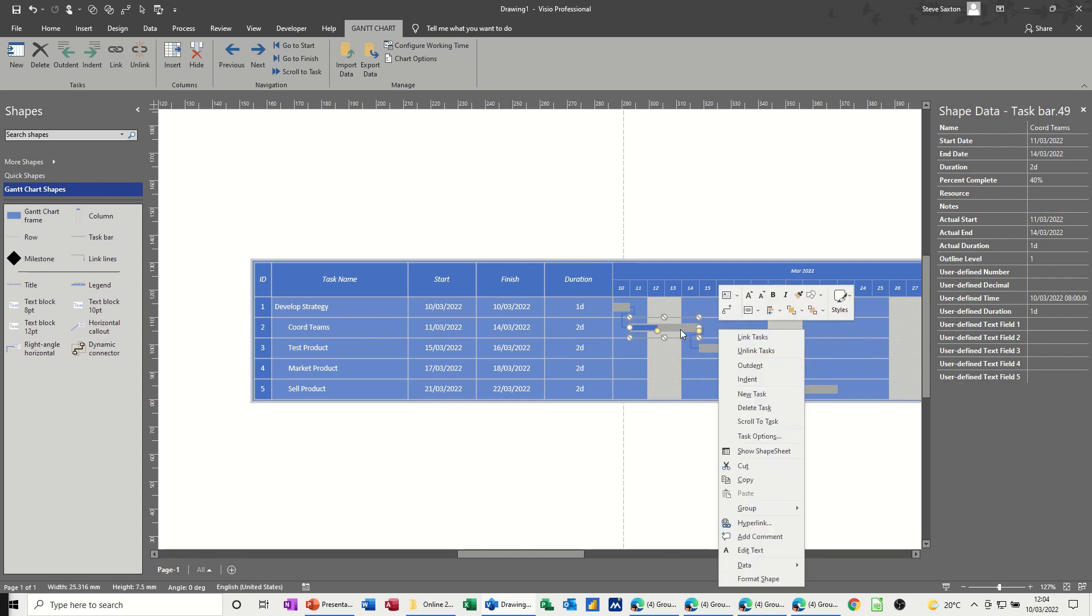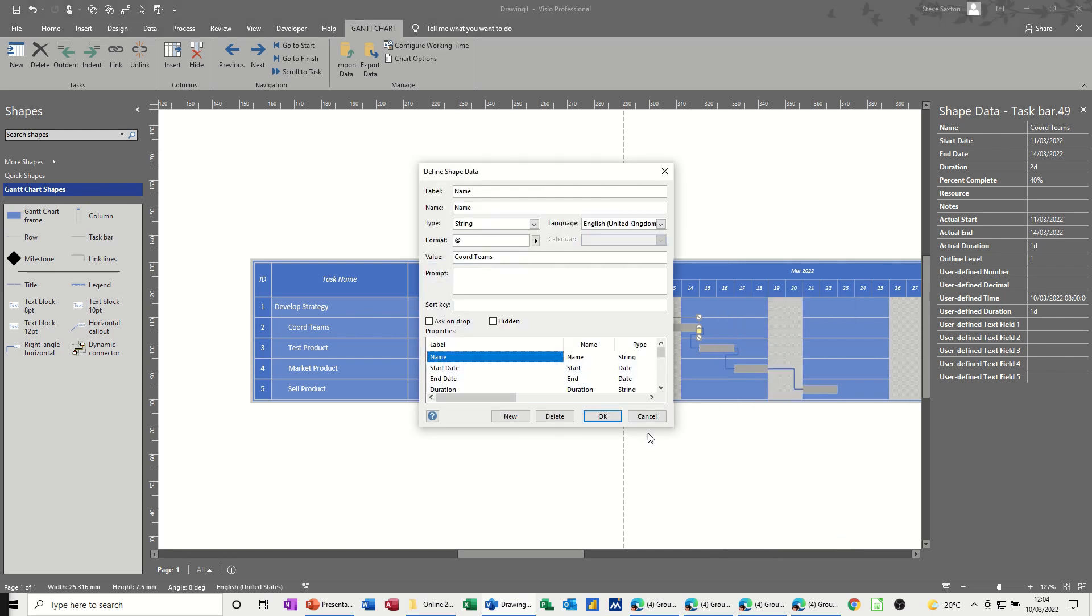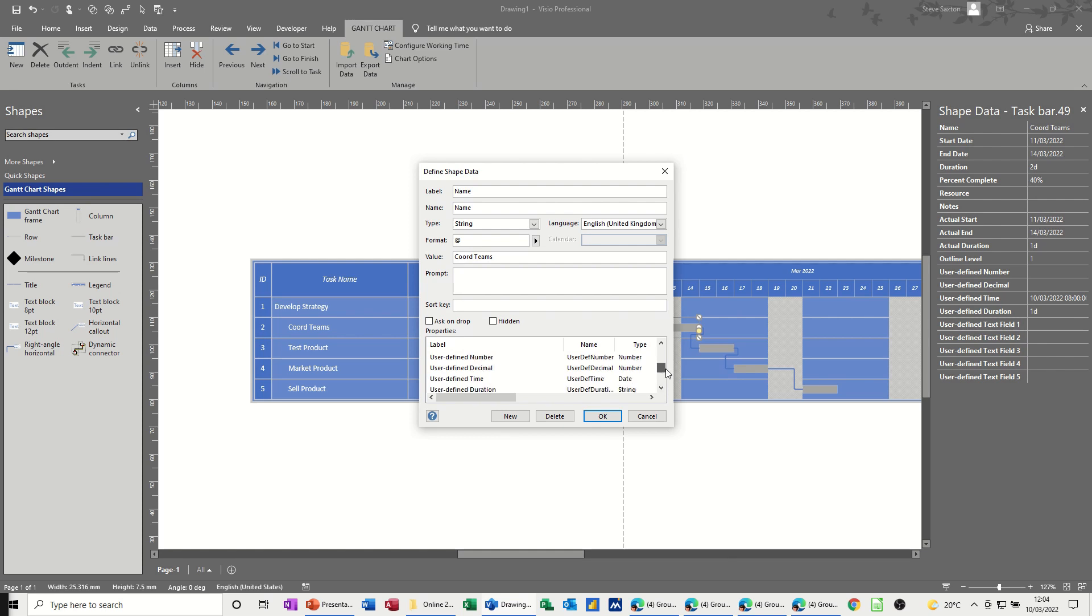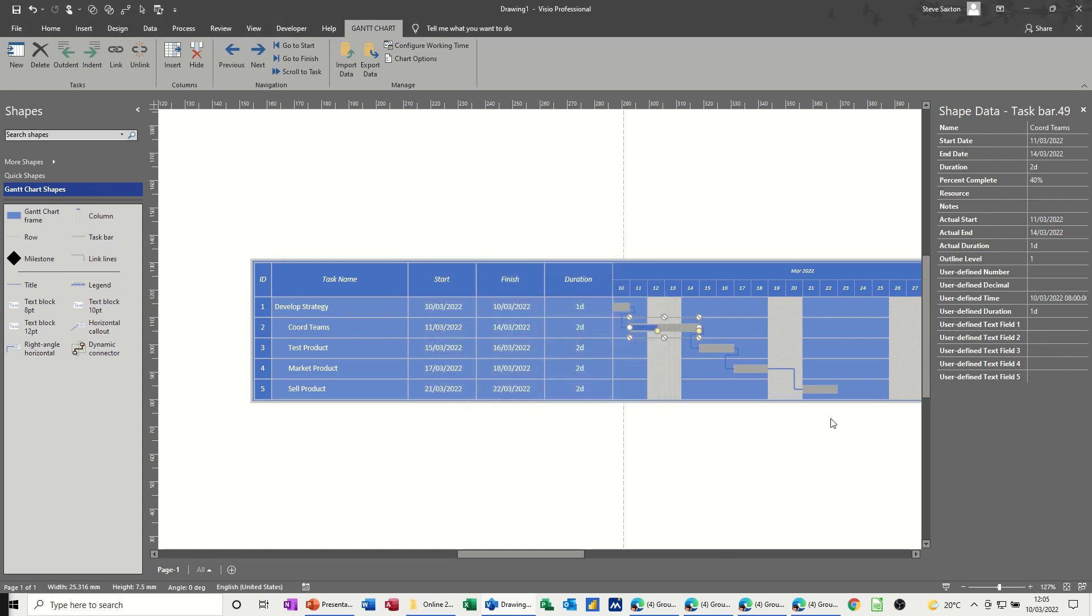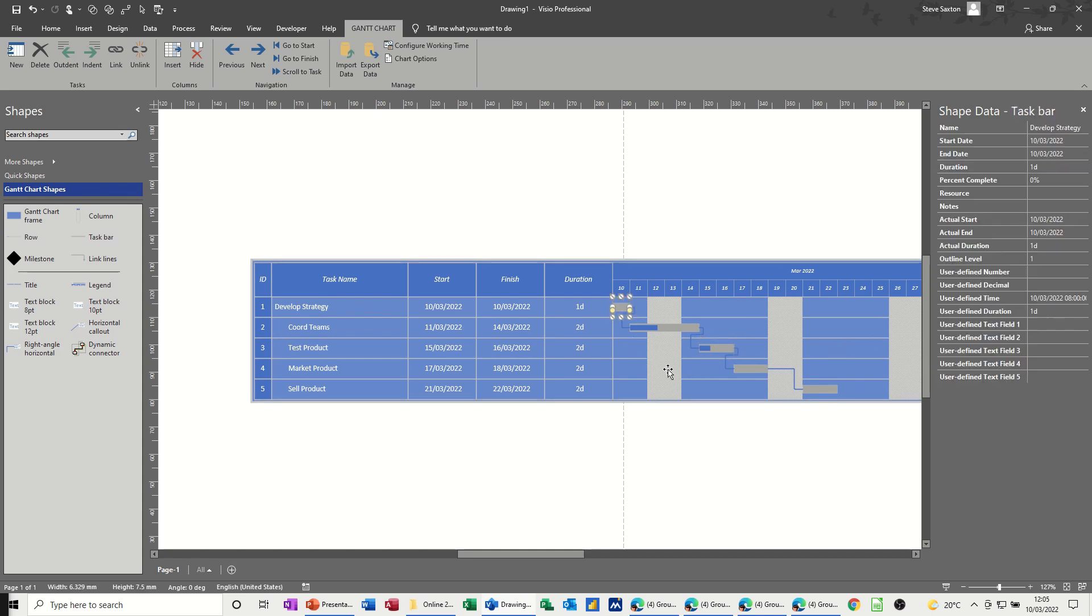And if you right click on the shape, you can go into define shape data and add your own, or delete some of these if you don't want all of these. I'll just cancel that for now. Now so each shape, if you click on each shape, it's got that sort of information, so I'll just change that to 34% and you can see how that works. And I'll put that one to 100%, like so.